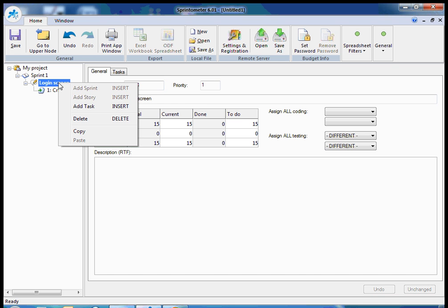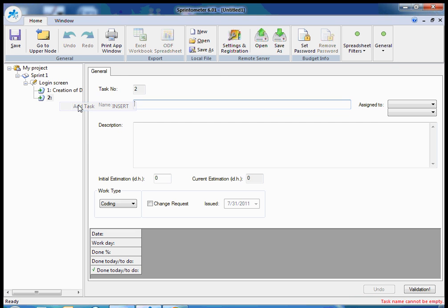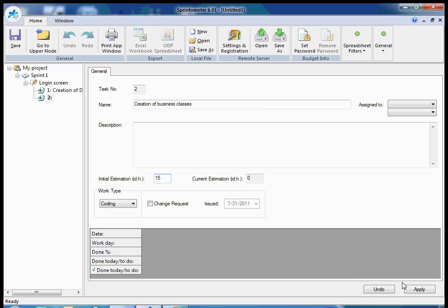I can add other tasks. For example, creation of business classes to support authentication. Let's define estimation of 15 ideal hours.